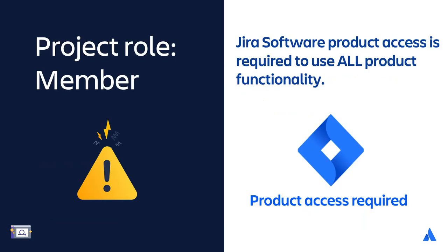It's important to note that users must also have Jira Software Product Access in order to interact with the product fully. Without this access, they will not be able to interact with any software-specific features, such as boards, so they can't, for example, manage sprints.